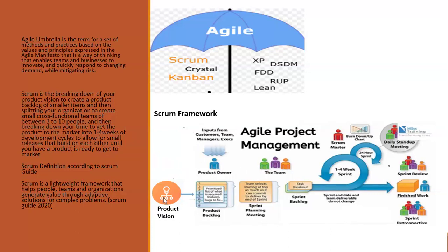Like I said, if you want to do a Scrum project, the first thing you need to do is a product vision, by getting information through information gathering. Under this product vision, you're going to know the purpose of the project, that is the goal. Then you know your target audience, that is your customers, the people who are going to make use of this project. The next one, you should be able to know the pain points. Why did the customer want to build this project? That is the pain points.